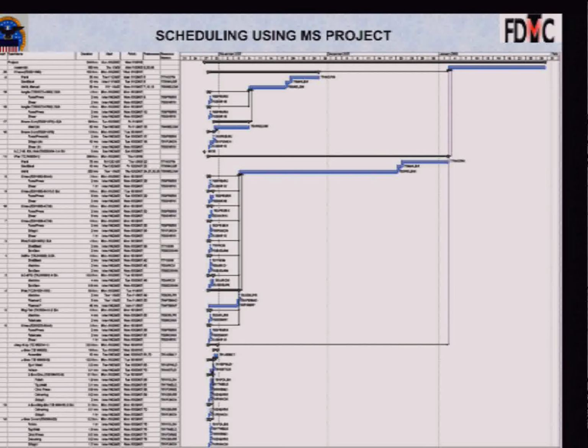And then similarly, if you've got shared resources and you have only one piece of that resource, if that resource is busy with job 2, you can't load job 3 on it. Job 3 has to wait. So people might say, well, Microsoft Project can't do scheduling. Well, I disagree. I think that if you had to teach people that scheduling is important, and you had a simple $300 package, which is a single license of Microsoft Project, I think you can tell them how value network mapping and this whole problem of synchronizing and prioritization of competing value streams which share the same resource,